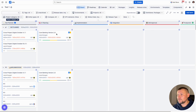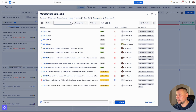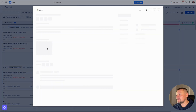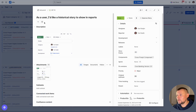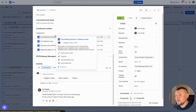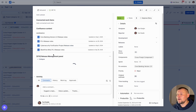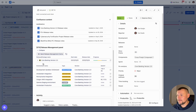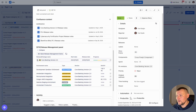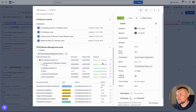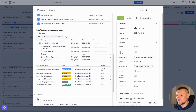I would also like to highlight that if you are using release management, you can see release management data inside each Jira issue. Open a Jira issue, navigate to your apps configuration button, and enable the release management panel. Once done, you can see all data connected to this issue in the context of release management: what releases it belongs to, what packages belong to this release, the progress, deep links to a version and package, and on what environments this version and issue is currently available.